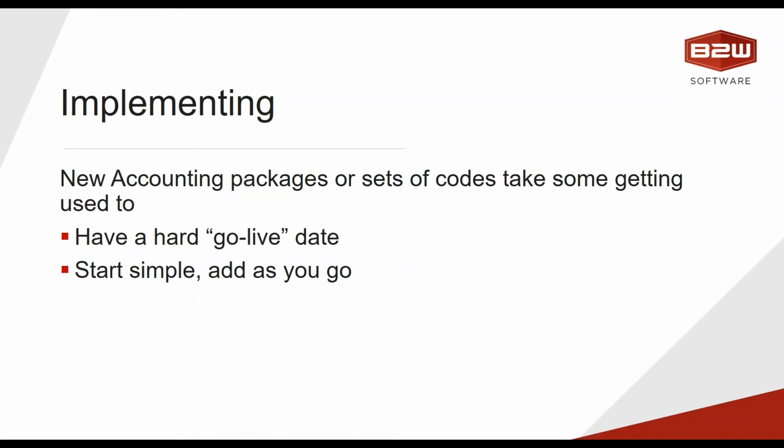So having a hard go live date and again, explaining to people why you're going to do it, what it's going to get them, teach them how to use it, but then say, starting Monday, this is the only option. That tends to have higher success than having a soft, hey, you guys can do it this way if you want, but we aren't going to make you for another month. Have a date where everything's good to go and you start it up.